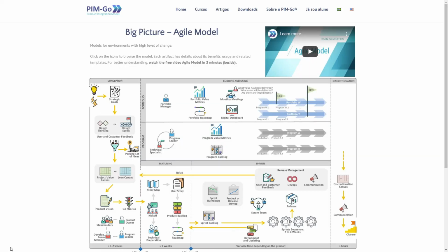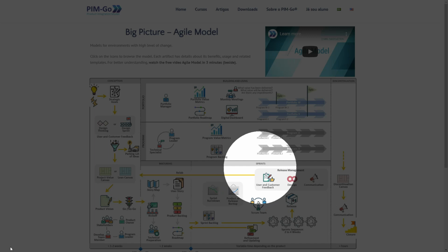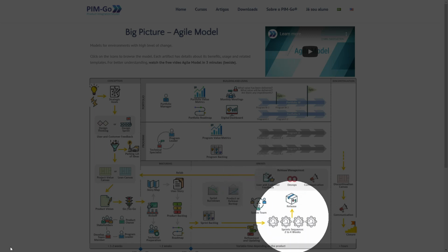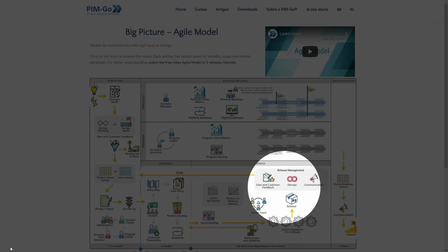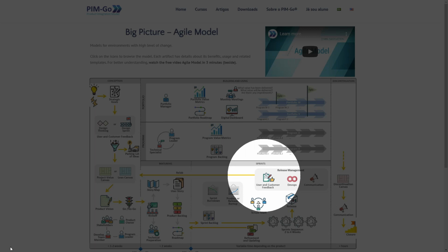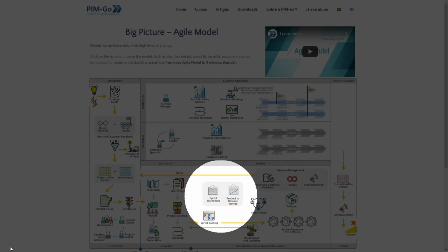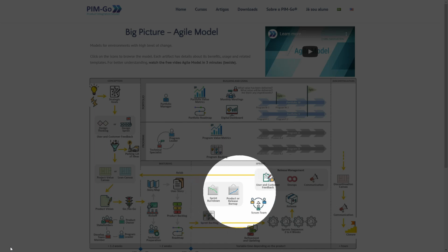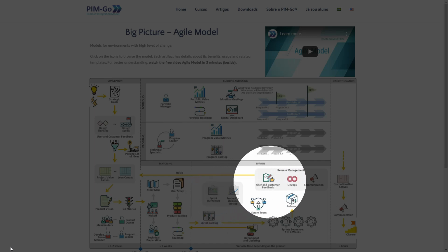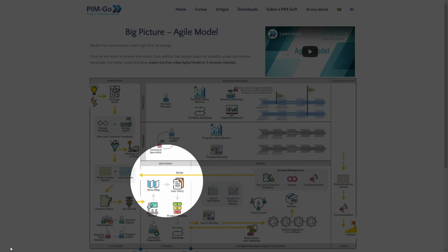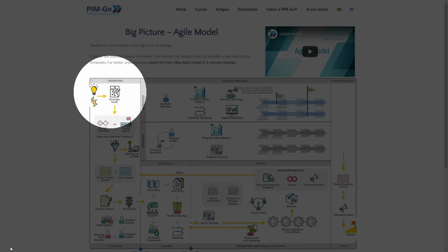So moving to the sprint phase, the product starts to be developed using the Scrum framework. After every sprint, an increment is generated. If it's going to be released, feedback can be collected directly from the users. A burn down and a burn up can be used to better manage the development process. But let's remember, if something goes wrong and the users don't see value in what we are creating, we can always go back to the maturing phase or even to the conception phase.